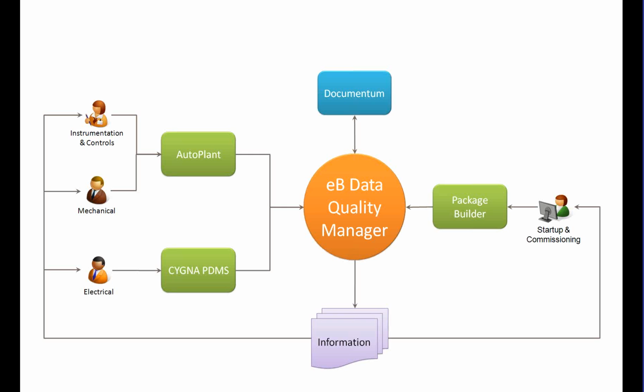If through this process, and this was our goal, we could knock that down to 60 minutes per asset, saving 15 minutes per asset location, that's about a 20% savings. That saves approximately 37,000 man-hours over that 2-year period, or approximately $3.75 million. Now, in context of the overall project, that's a very small percentage. But in the context of the budget and the schedule for that particular group, that's huge.